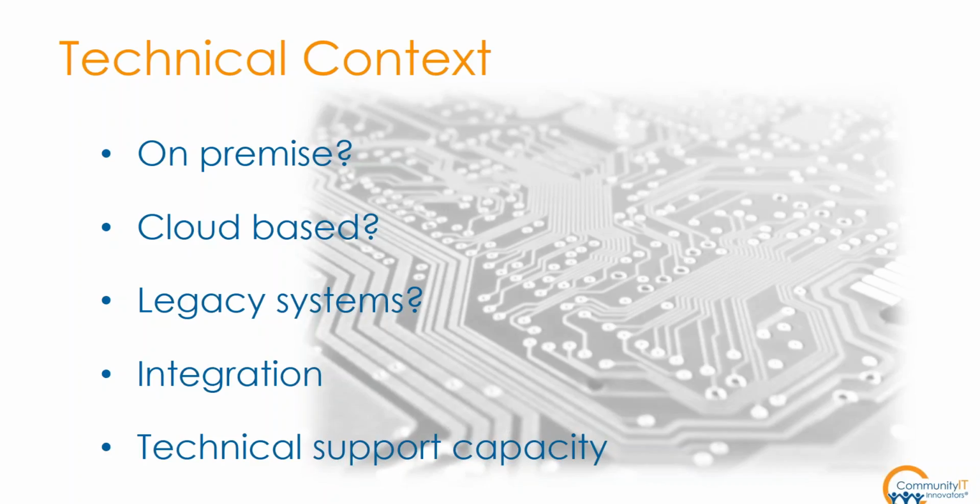For example, a school that's looking at rolling out Chromebooks, that's not necessarily a good or a bad choice in and of itself. You want to look at what other systems the school needs. You don't want to just move full speed ahead and not realize that the ESOL teacher has a program that only runs on Windows machines. That's right. So understanding the full technical environment is important, and really understanding how the new system is going to fit into that technical environment can affect the decision that you make.